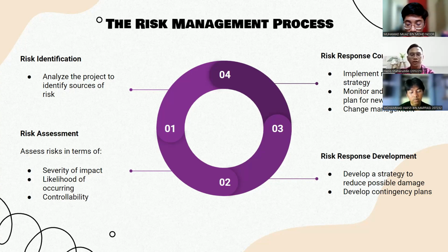We need to develop a method to sift through the list of risks, eliminate the redundant, and rank the worthy in terms of importance. For the third step, after we know the risk, a decision must be made concerning which response is appropriate for the specific problem. Responses to risk can be classified as mitigating, avoiding, transferring, or retaining. Moreover, a contingency plan is an alternative plan that will be used if a possible risk event becomes a reality.